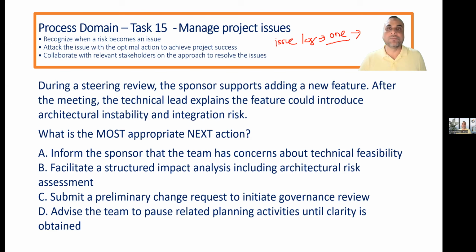That one person will resolve the issue and provide corrective and preventive actions, and those actions will be implemented by following the change control procedure as required. Then those things go into the lessons learned register during the project, and once the project is finished, they go to the lessons learned repository in the OPA, so it can be avoided in the next project.